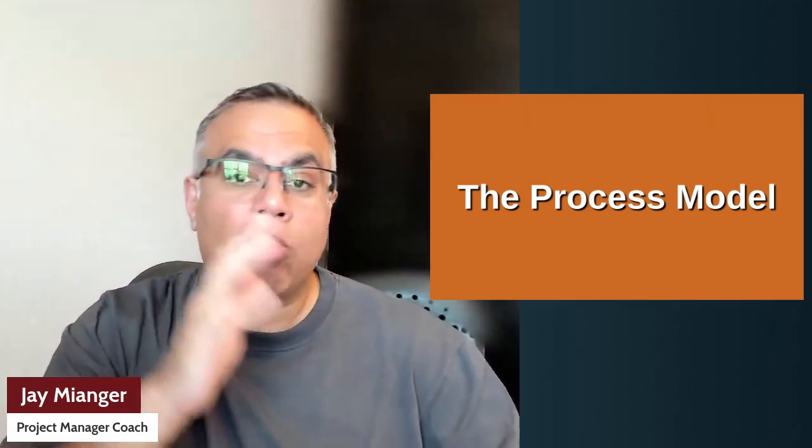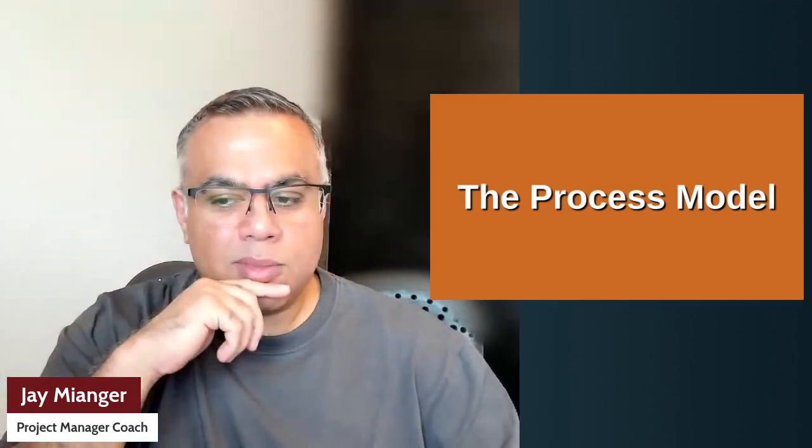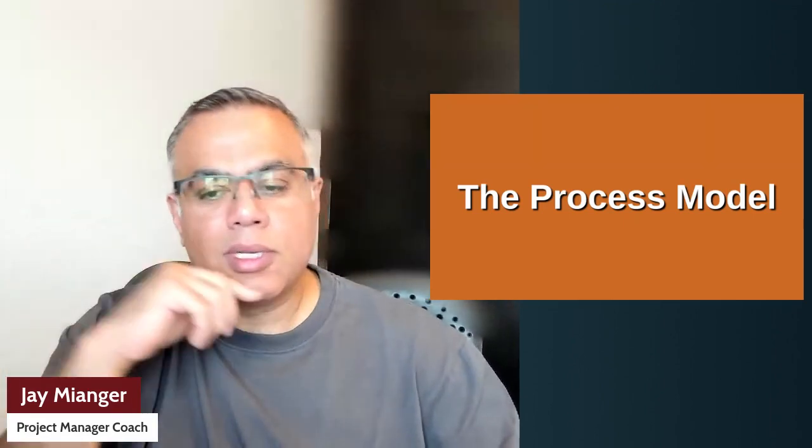And then you go on to managing a stage boundary, as it's called. At the end of each stage, this process is executed to assess how well things have been done, review how it has aligned with the business case, and plan the next stage, etc. However, this can be quite a lengthy period, or you've done it too late to learn from some of the mistakes, and it's on to the next big project before you're allowed to actually learn from that. And then finally is closing a project.